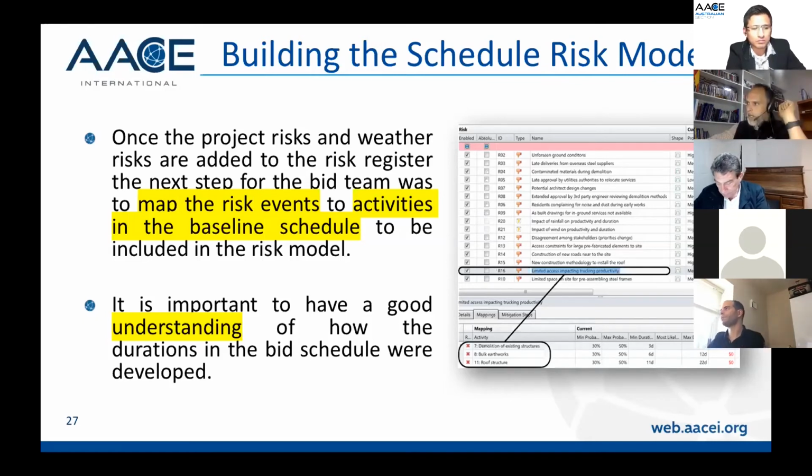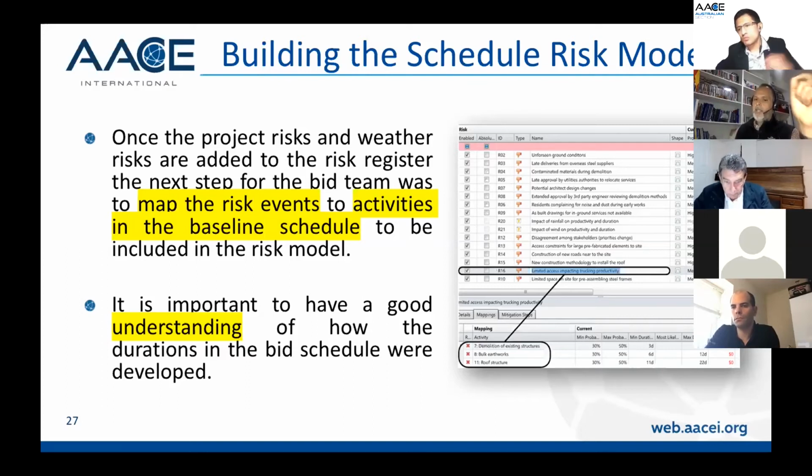Now, something that is very important for you to understand is you need to have a very good understanding of how the duration and the baseline schedule were developed. Why do I say that? If you already have in your schedule a duration that takes into account difficult access to the site, you need to be careful that you don't put this again in the SRA, or you're going to end up with contingency over contingency. That's why I always prefer that the person who builds the SRA is the person who built the baseline schedule, because that's the person who really understands the basis of the schedule and how the durations were developed.